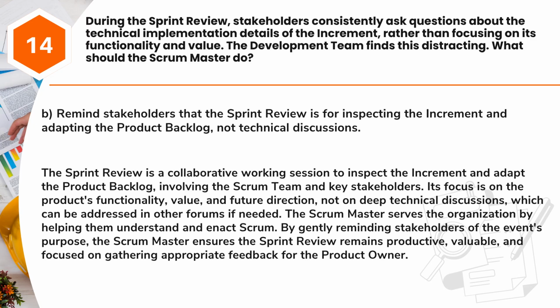Answer: B. Remind stakeholders that the sprint review is for inspecting the increment and adapting the product backlog, not technical discussions. The sprint review is a collaborative working session to inspect the increment and adapt the product backlog, involving the Scrum team and key stakeholders. Its focus is on the product's functionality, value, and future direction, not on deep technical discussions, which can be addressed in other forums if needed.